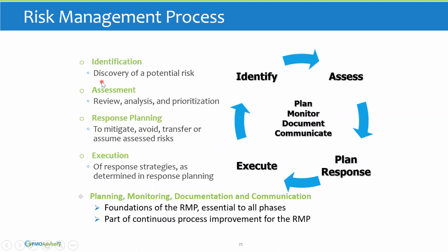So here's a brief overview of the risk management process. And if I gave you my business card, you would see on the back of my business card this actual process. I like it. It's simple. It's got 5 steps: identify, assess, plan responses, execute, and then all the while we're planning, monitoring, documenting, communicating.